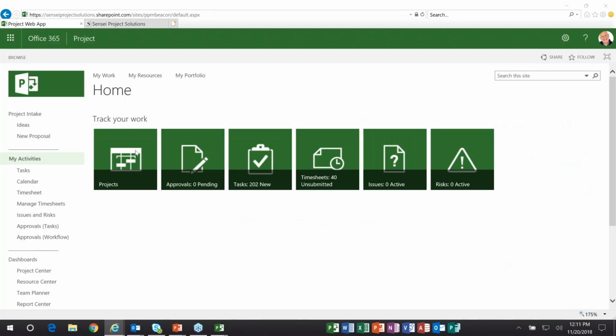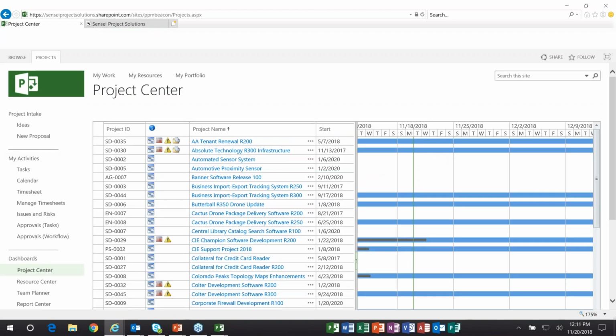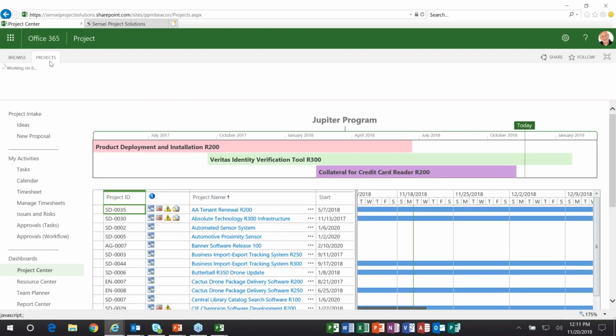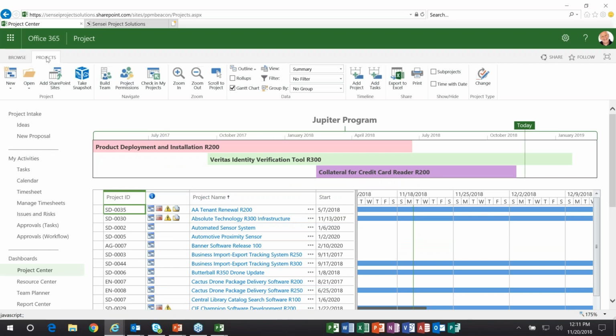Now what I wanted to show you is this, Teresa. The gotcha is if you save master projects in your Project Online system, what Project Online will do is it will automatically hide the sub-projects. They disappear, and you're going to start asking yourself, where did my sub-projects go?